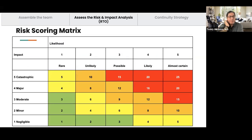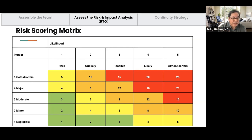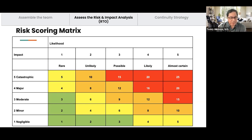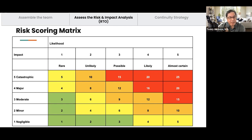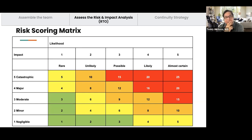This is an example of a risk scoring matrix — one methodology for planning risks so you know what to address first. Some risks may have catastrophic effects but are very unlikely, so they might not be the right risks to prioritize. You rank the impact from one to five: one being negligible effect to the institution, five being catastrophic — where you truly cannot function. For this pandemic, the effect on our academic functions I'd rate as major, a four — it affected face-to-face classes and internet access for students.